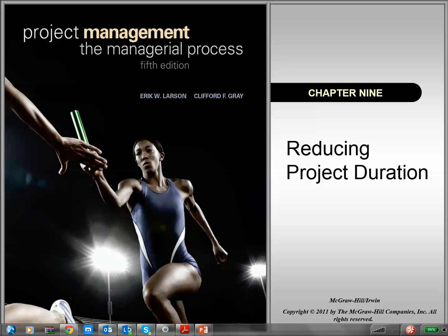But now you've gotten a situation where maybe your project is behind, maybe there's an estimation problem, and you have to try and think of ways to catch up. So you're going to add resources to certain activities in your project to try to reduce the duration. But as we've seen, trying to do that increases risk. What does this mean? It means you may spend more money and put a lot more resources on the project and end up still being late, maybe even more late. So it's something to consider.